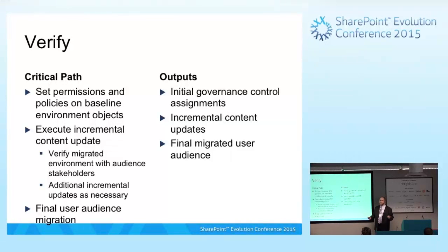We didn't have to do the cutover right when the baseline finished. We could give it some time to test the permissions, to go through marketing and training and make sure the organization was ready to move. Make sure that they were bored out of their minds when it came time to cut over. They just wanted it to be done.